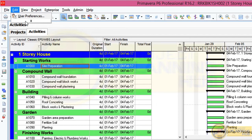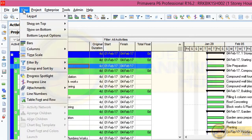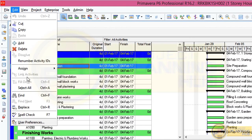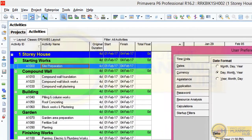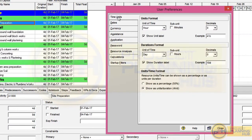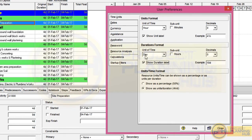Sometimes the menu will be in compressed form and you need to expand it by clicking the arrow mark. Go to the Edit menu and select User Preferences. In this window, on the left side, select Time Units. On the right side you will see Duration Format. In the drop-down, make sure the selection is Day. Also select the option Show Duration Label. After selecting these options you can see a preview.